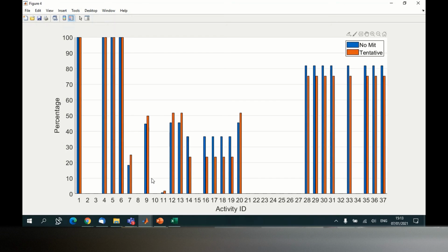What you can do is have a higher level planning with more generic activities. That's one way of making it less complex. The other thing could be that you just take a part of the whole project, not the total duration, but focus on one part where you then apply your simulation.